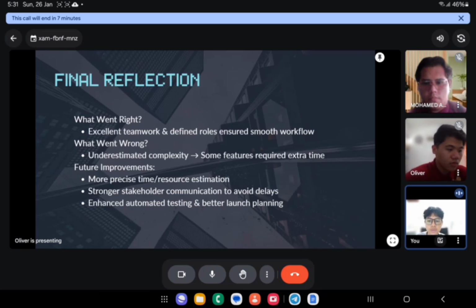And then lastly, user experience UX risk. The third risk concerns the app user experience. A poorly designed interface or lack of usability testing can result in high bounce rate and low engagement. This issue stems from inadequate design and insufficient user testing. By redesigning the interface and conducting user testing, we aim to create a seamless user experience.